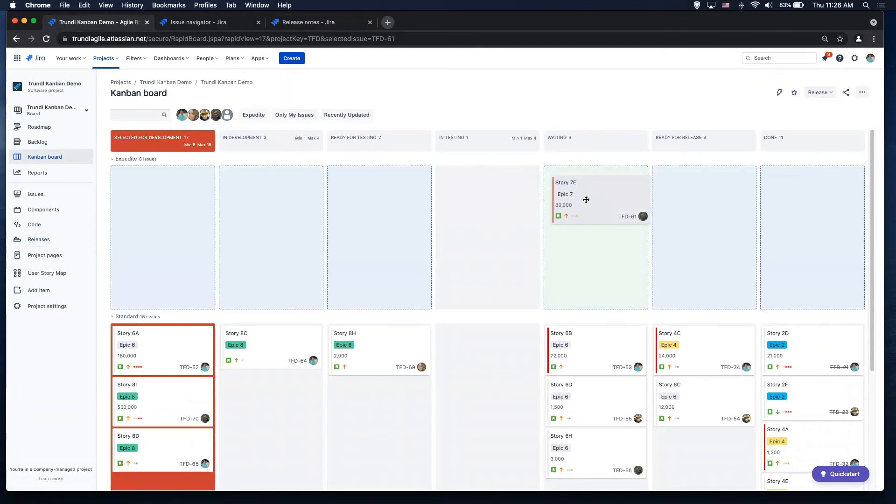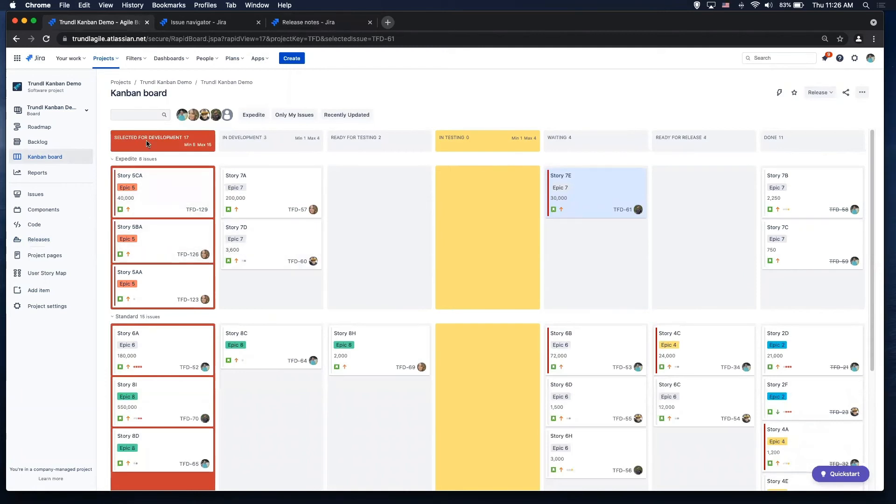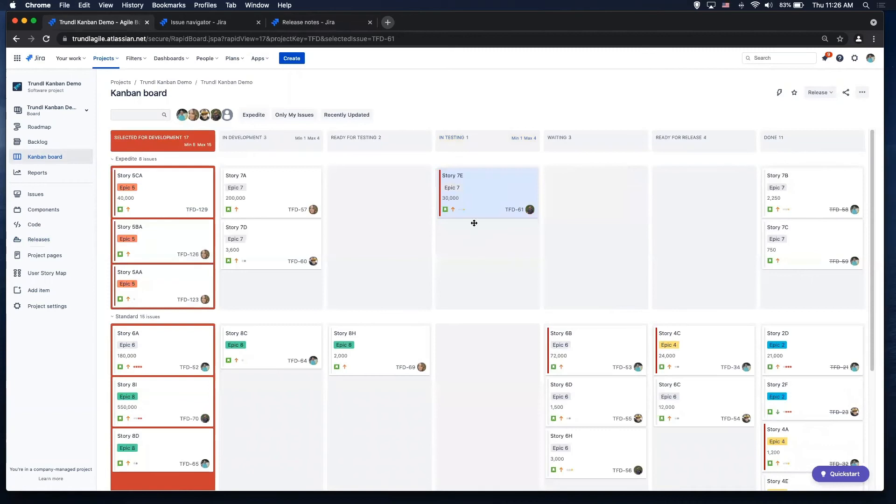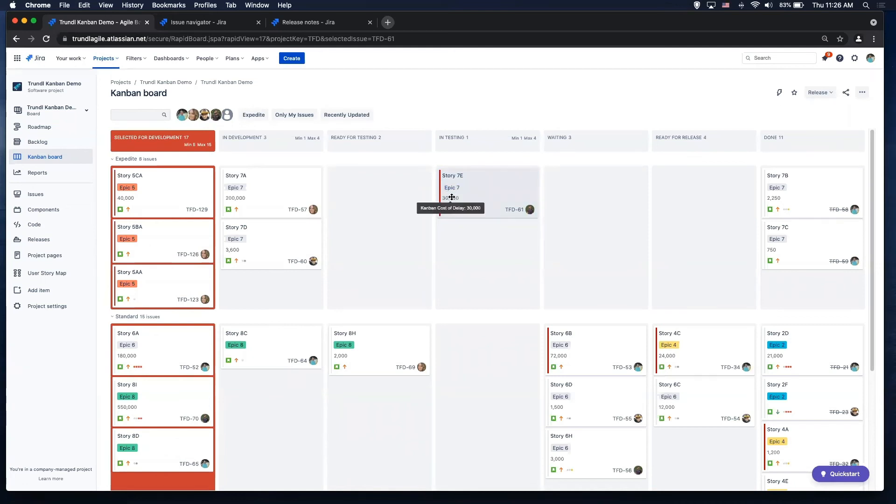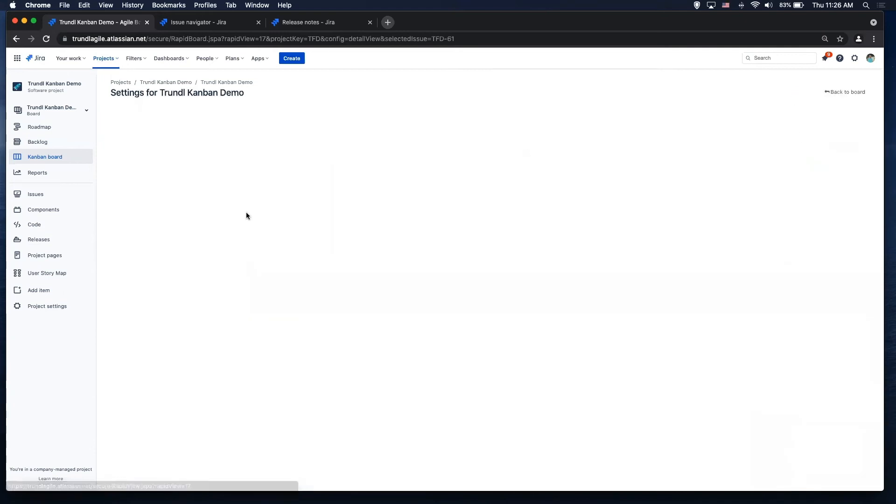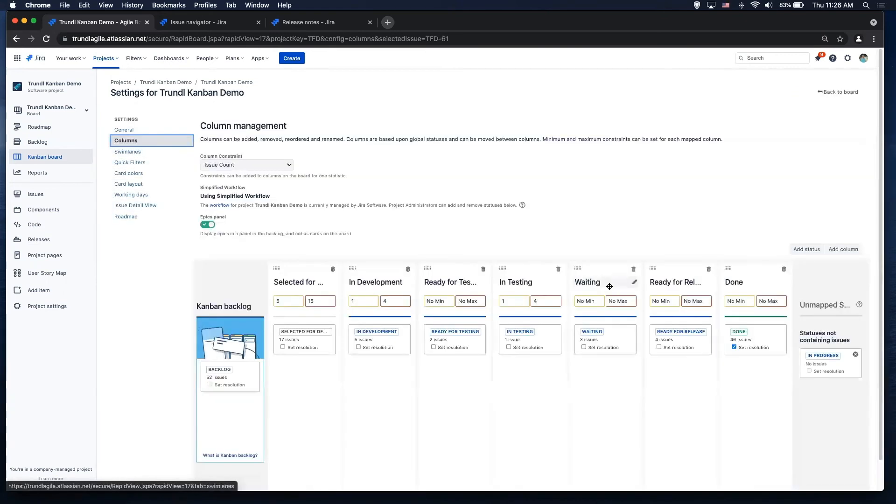Notice too here, if I move this one to waiting, this column turns yellow because my minimum is one. So if I don't reach my minimum, then it's going to turn yellow. If I go over my maximum, it's going to turn red. Notice I have configured on my cards the red on the left-hand side for unplanned work. I have configured my cost of delay here as well. So I have some fields added on there, just to show you how that looks in the board settings.